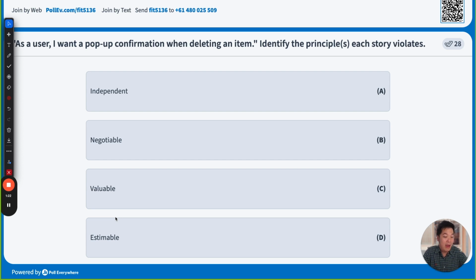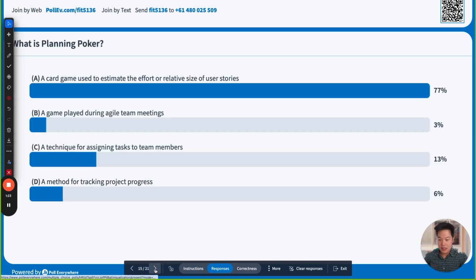because it doesn't provide any value to the customer. Why do we need to say what the value of the pop-up confirmation is? Pop-up of what? It's not really clear. You know what I mean? So I would not write it this way. Avoid dependent actions, like after I log in, after I purchase a product after login. Avoid that. It is not independent.